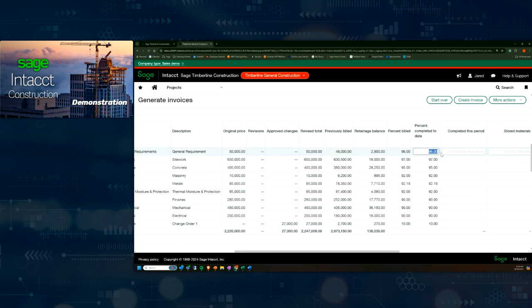And then here I would just be able to update each of the % complete values directly from here. Now, again, I would mention if my keyboard was working, then I could also see the % as I update this. It would put in the dollar value directly in this field. And I can also overwrite that dollar value, and that will back calculate to that percentage field as well.